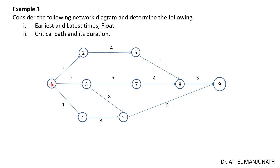In this network diagram, the circles with numbers — 1, 2, 3, 4 — are called events. The lines with arrow marks connecting events are called activities. From one event to the other, the activity is connected and its value — for example 2 — represents the duration to complete that activity. Using these activity durations, we need to calculate earliest time, latest time, float, and the critical path.